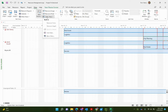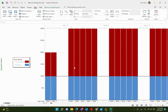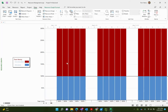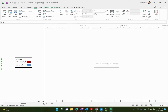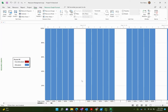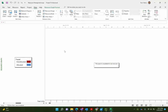Another view is the resource graph, found under 'Other Views.' Here you can see over-allocated resources and how badly they're over-allocated. Over-allocated means they're working more than their calendar allows — most people work 40 hours a week, and if you assign someone more than eight hours a day they become over-allocated. You can see here 300%, meaning Tom Henry has been assigned 21 hours of work in a single day. As we scroll through, Krista is at 100% — not over-allocated at all.